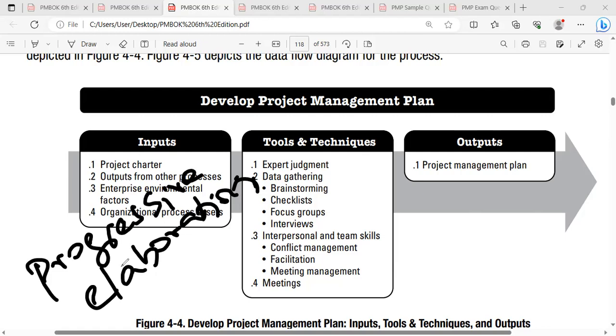Yeah, as long as it is not processed further, internal changes can be done. If it is not baselined, we can do the changes. Once it is baselined, then we cannot do the changes. Once you are sending all the documents, and all the documents are integrated and you got your baselines, once it is baselined properly, once it is integrated after the approval and all the management plans are integrated,